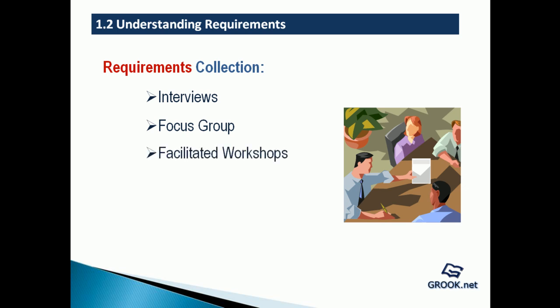Facilitated workshops are well-planned interactive sessions where stakeholders from different sectors of the project get to interact and resolve conflicts in their ideology. Examples include joint application development (JAD) and quality function deployment (QFD). These help in sorting and prioritizing needs and goals.